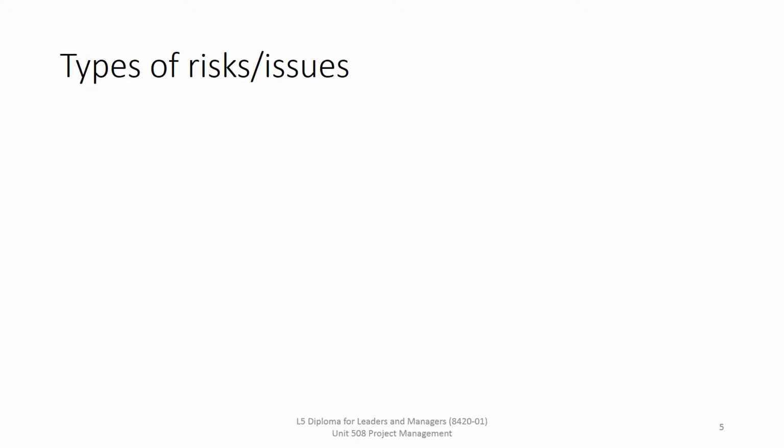And there are many types of risks that we may face. Often they're focused around things that are new, such as a new supplier, a new process, new technologies. Those sort of things are definitely going to have a presence that will cause a risk. Or they could be things about dependency, so a sole supplier or only one customer, etc. And there are specific ones. It could be something like an export license not being granted in a timely way, system interfaces not being compatible when we get a new system in, a regulator introducing a new set of requirements, or severe weather, which is a common one in Britain that could impact on a project.